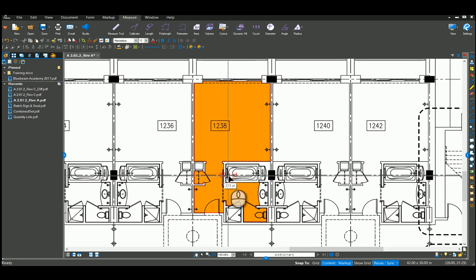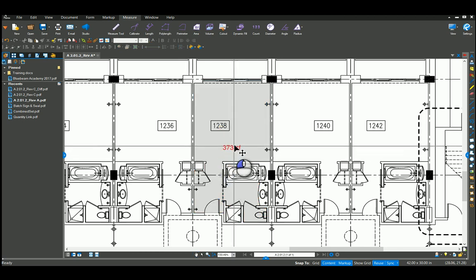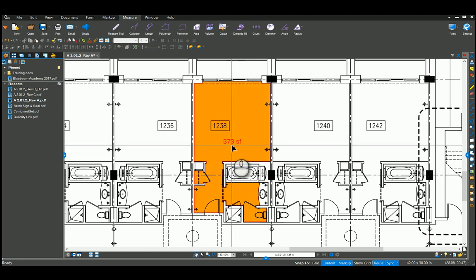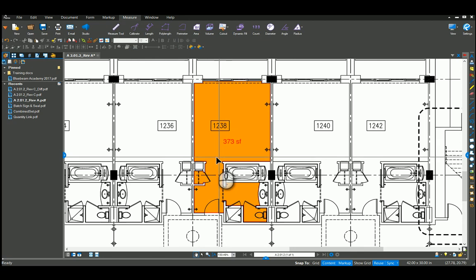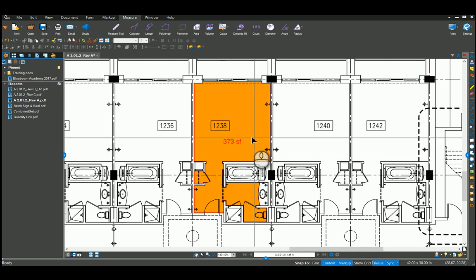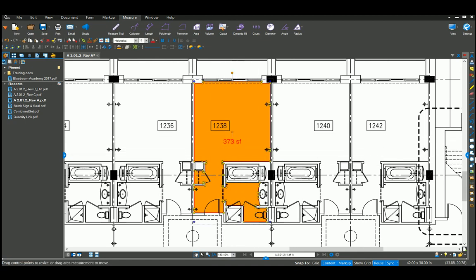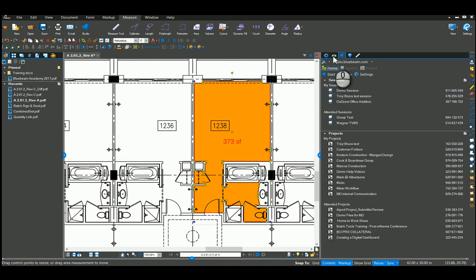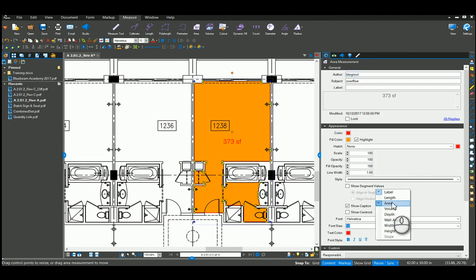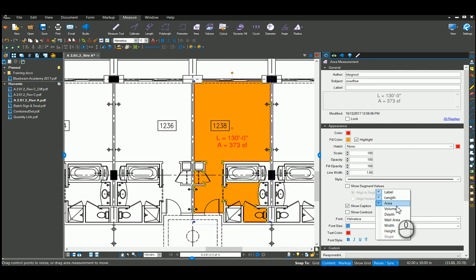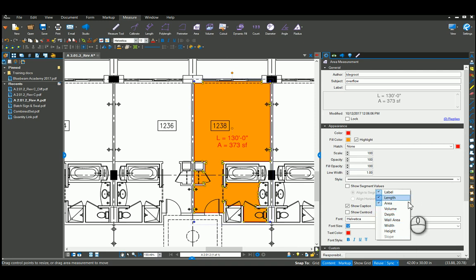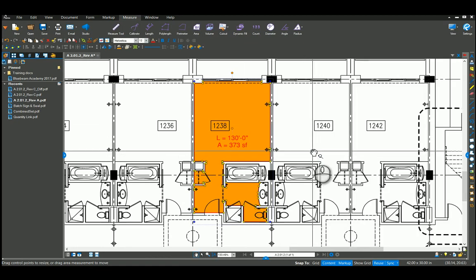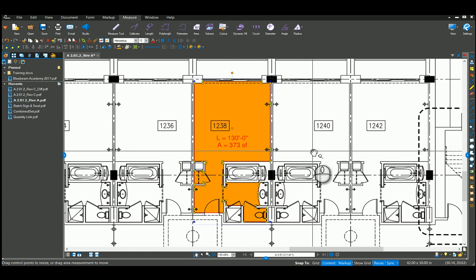I'm just going to hit apply and close. If I hold my shift key down, a little tip here, you can grab that square footage marker and drag that up here without moving the entire thing. So now I have my square footage. Once I have that, I can jump over into my properties tab over here and the captions. I can click on edit, turn on the length. That'll basically give me the length of the floorboards or crown molding around the exterior volume. If we set a depth to the room, all kinds of different things that we can figure out here with that one simple markup. That is your dynamic fill.